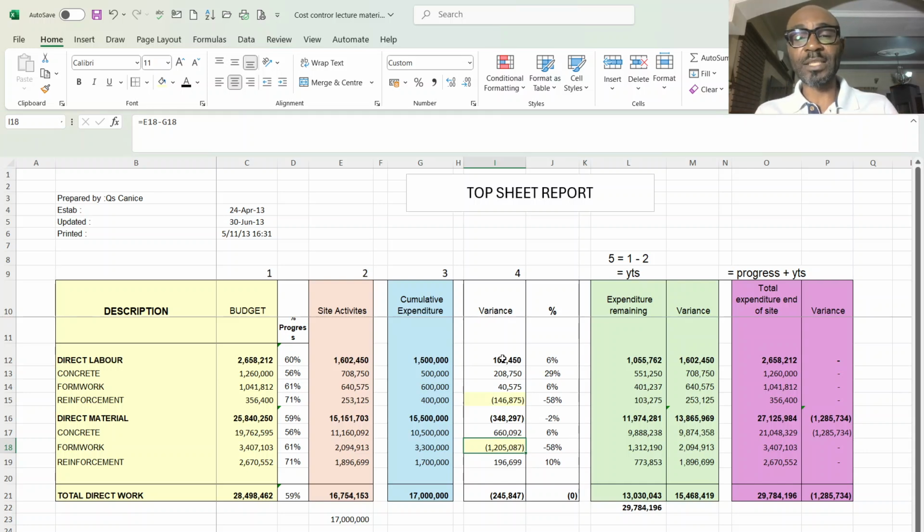So as you can see, and you remember, for the end of site, we were having differences because cement has shifted to 220 from 190, reinforcement and granite have shifted by 2,000. This is the variance.